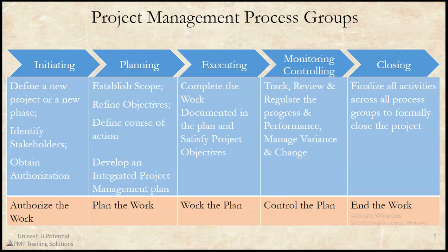That means at the time of initiation, you define a new project or a new phase, you identify some key stakeholders, and you obtain the authorization from the organization. So at the time of initiation, 2 things happen: one is authorization of the project, and at the same time, authorization of the project manager.